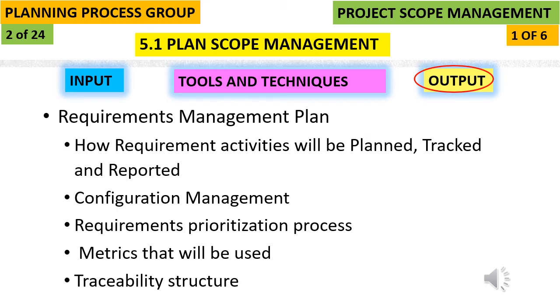This plan also includes the activities of configuration management, like how the changes will be initiated, how the change impacts will be analyzed, how the changes will be traced, tracked, and reported, along with the authorization levels required for approving these changes. Different techniques and technologies can be used.